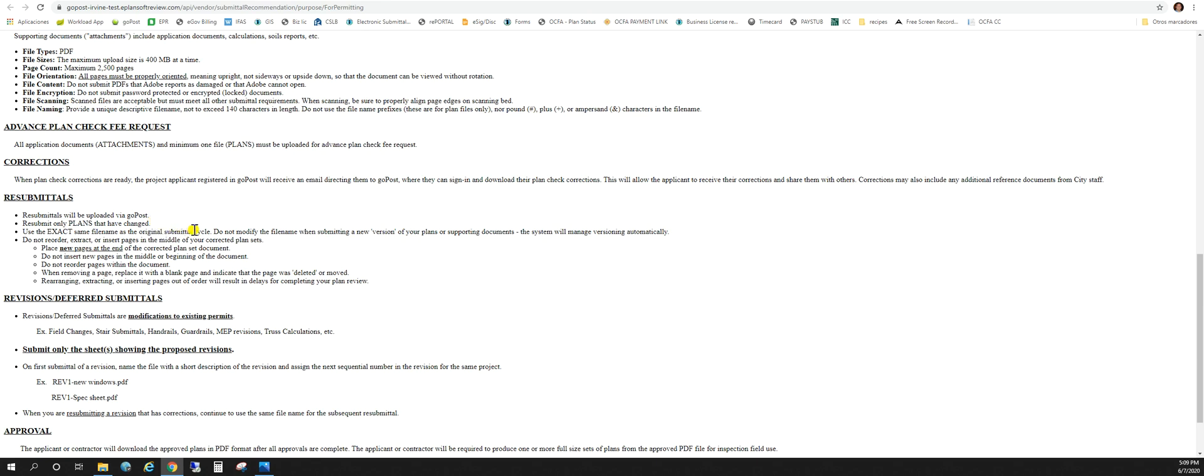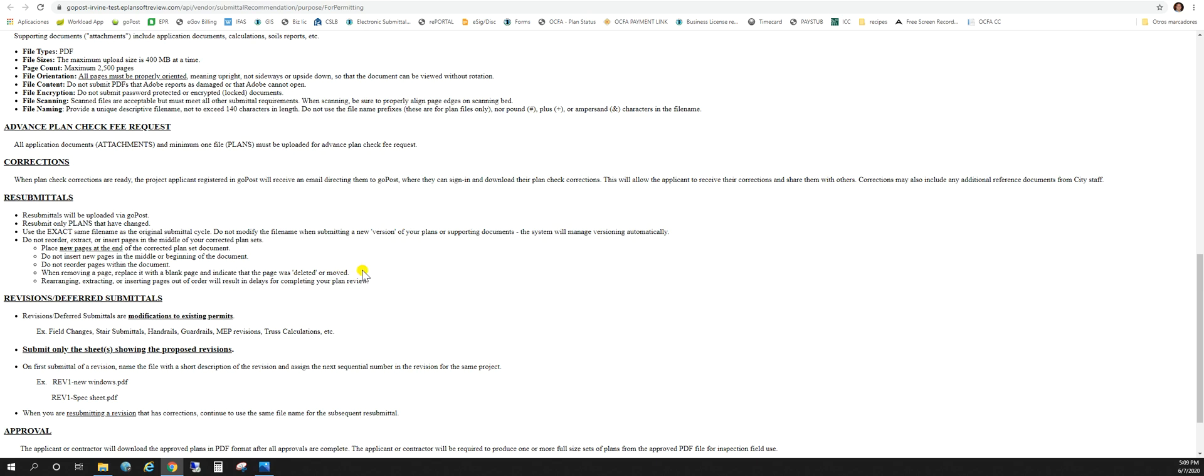We're going to want to use the exact same file name. Don't reorder your plan sets. If you have new pages go ahead and put those at the end of the document. When you're removing pages, replace with a blank page and indicate that page was deleted or moved. The other option is just to put a big red X through that page and hit the word omit as well.